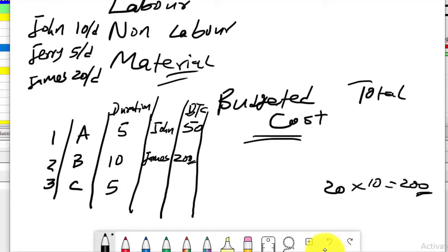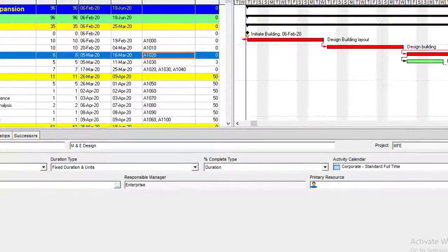So that's exactly how Primavera estimates the cost of activities within the project, and that's what you're going to be seeing as we begin to assign those activities. Where we're going to be paying particular attention will be the budgeted units for each of those activities, because budgeted units tell us how many of those resource persons are going to be working on that particular activity, and how long they are going to be working on it. All of that is part of what we are going to be illustrating using Primavera P6.